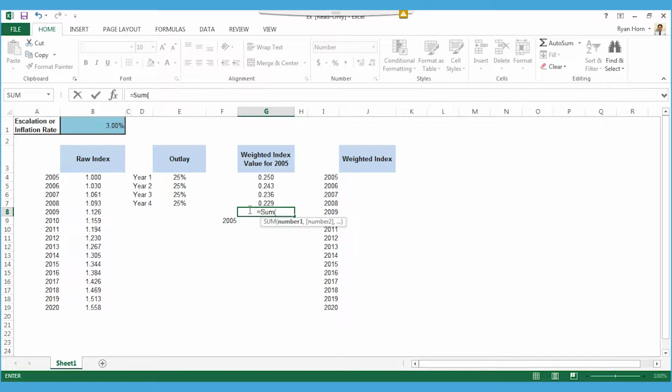If we sum the values, we can find that the contractor is only receiving 95.7% of the dollars they needed to produce the Navy ship due to the escalation that has occurred between 2005 and 2008. In order to provide the contractor enough money to produce the end product, we'll need to convert the $1.